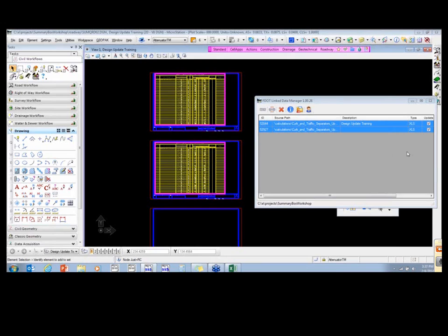Those three, lump sum, yes, the contractor bids on, but the other two, the contractor doesn't bid on. So those two need to show up, and the lump sum 999-2 will be in your summary of pay items, but they do not go in a summary box.